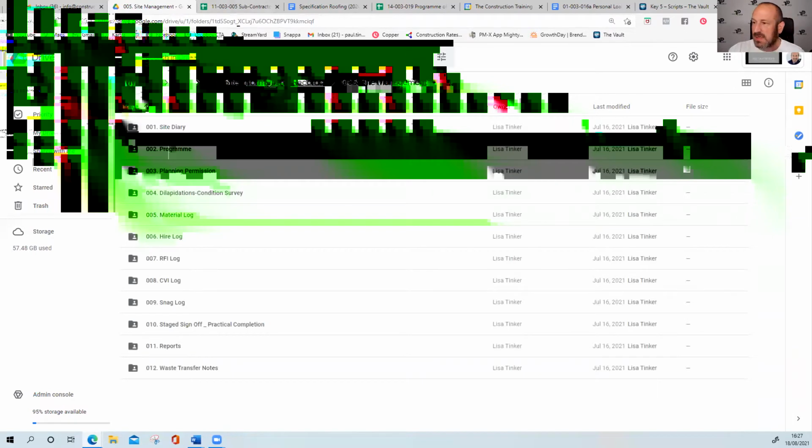Again, I've already, no, I'll go back into it and show you. So we've got a program of works where all of our tasks were listed. All of those tasks that have been listed now need to be what I call bought. We now need to go out to the market and find people to do each of those tasks.